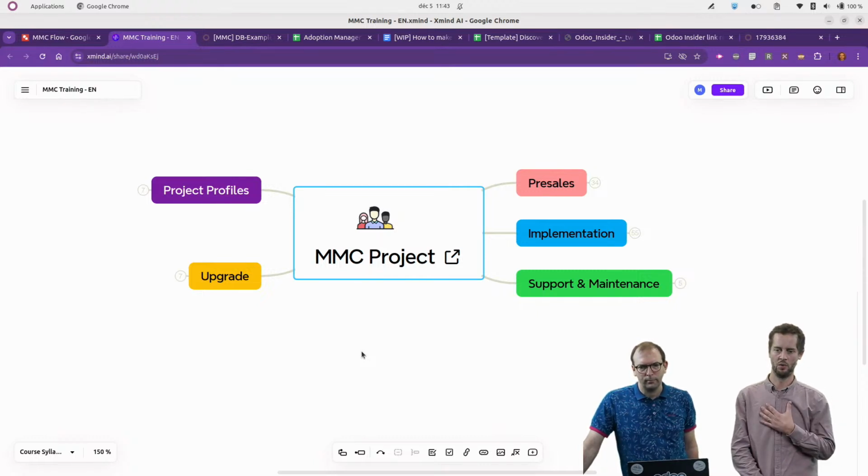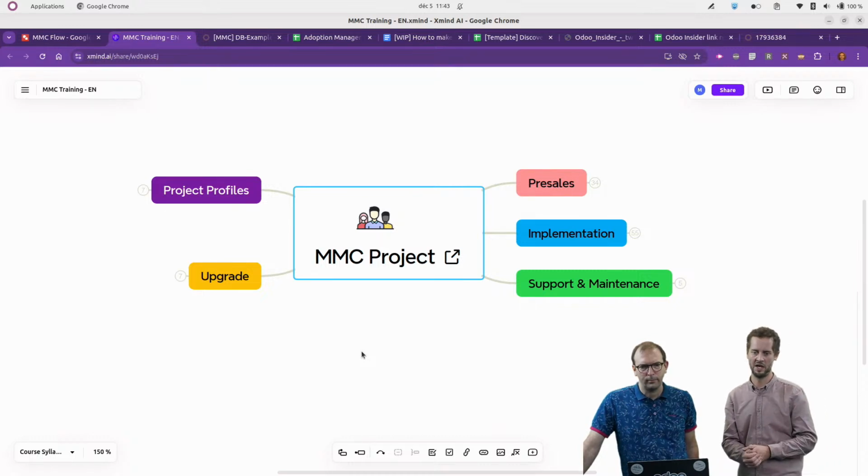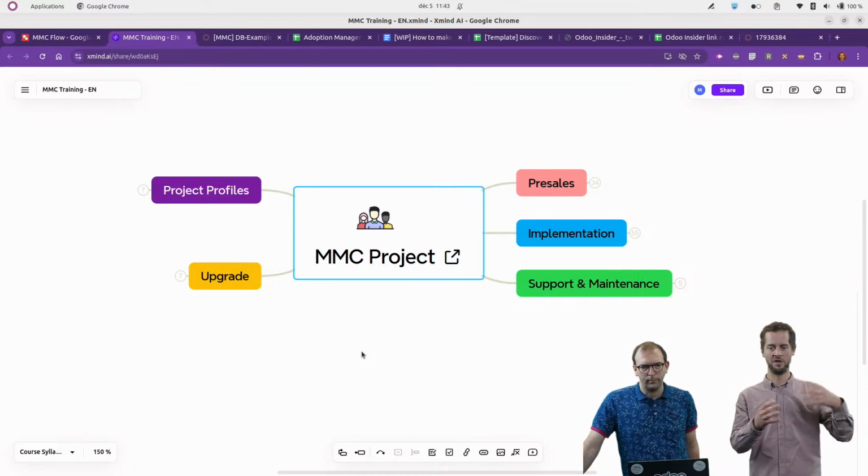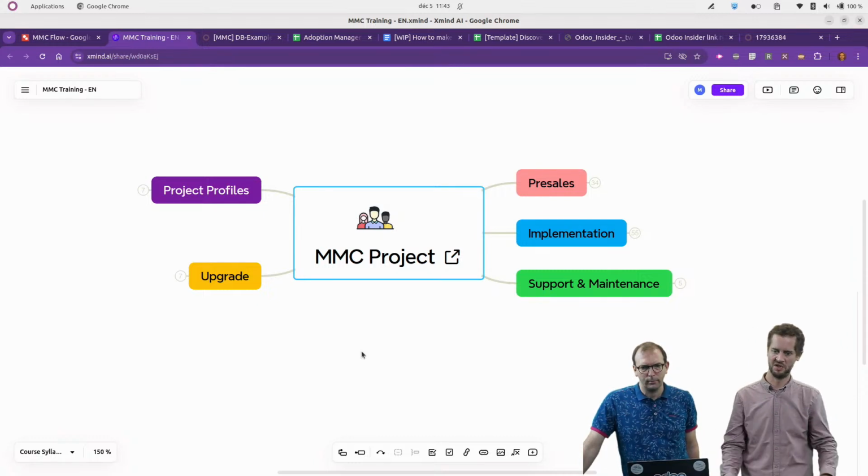At least I'm not aware of many cases, but this one was quite surprising, because we put the project live and only realized it two weeks later. Everything was correctly generated in Odoo, but nothing was validated, and we don't look at the activity on the database in really specific detail. It was really by luck that the PM went on the floor and realized that they were all working on Excel and not on Odoo anymore.